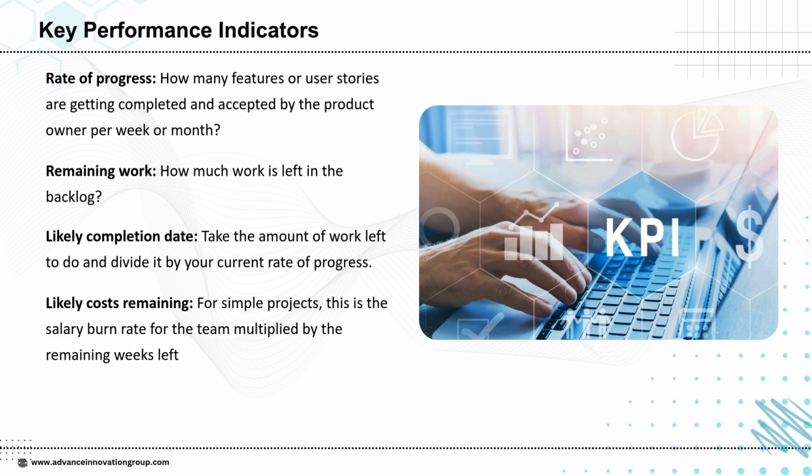Finally, there is the likely cost remaining. For simpler projects, this can be calculated by taking the team's salary burn rate and multiplying it by the number of weeks left. Together, these KPIs give project managers a practical way to measure progress, estimate timelines, and manage project costs effectively.